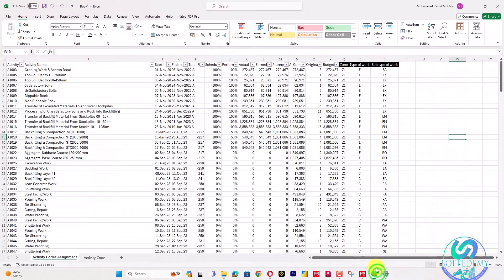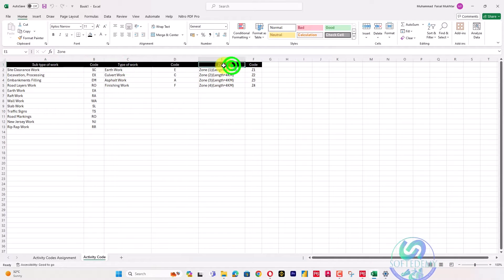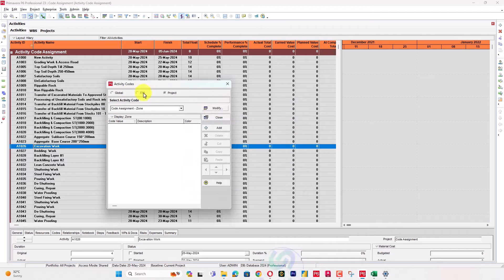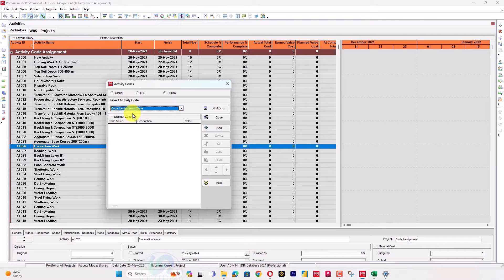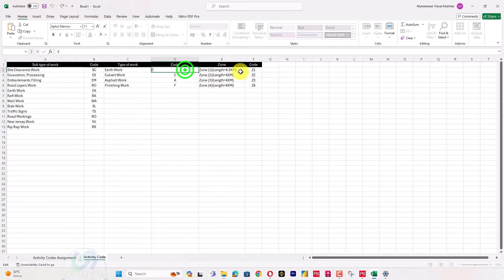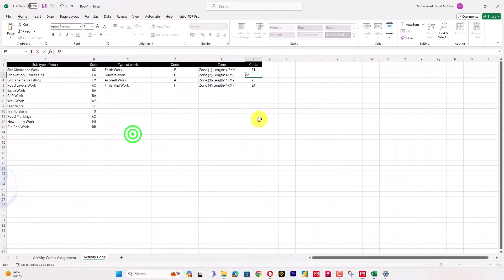I will go to Modify and create the main code headers. I have created categories including zone and type of work. I will create a code for zone, and after adding it, you can see the main code assignment is named after my project. I will create four zone codes: Z1, Z2, Z3, and Z4.